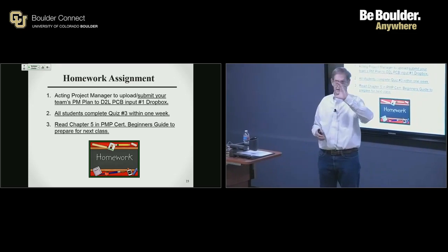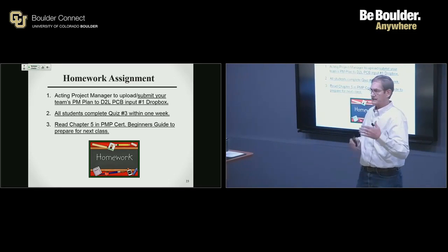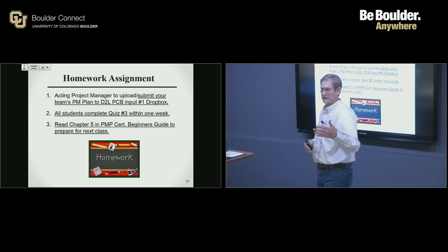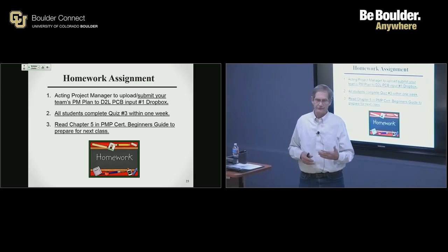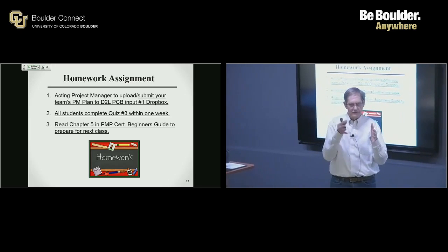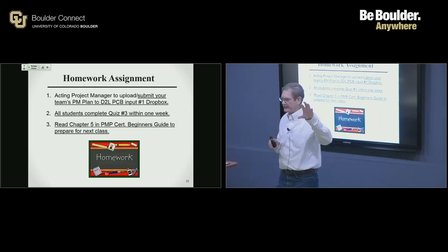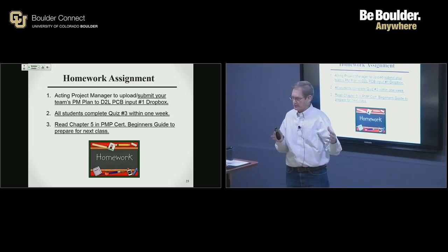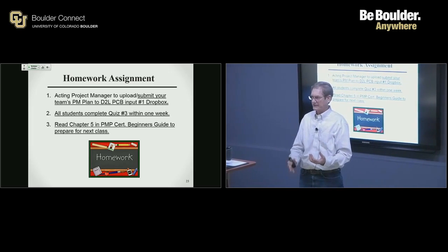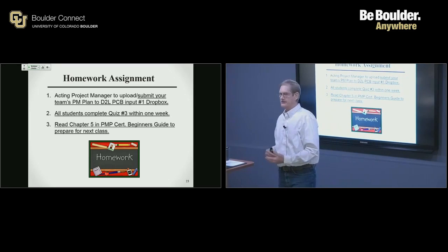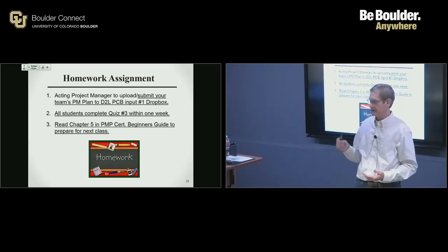So you're going to start off. Some of the information that you've developed as a team for your charter could easily port over to the plan. But the plan is a slightly different view of the world. The charter is, here's the big picture of the project, sign here. The plan is, here's how we're going to manage the project, sign here. So there should always be that sign-off at the end, those approvers at the end.